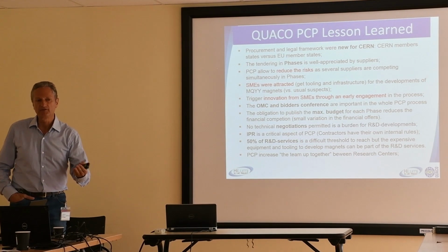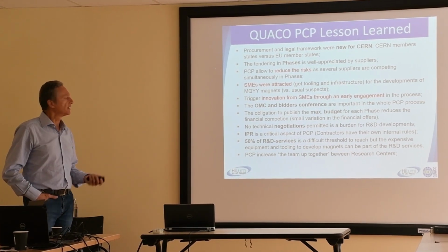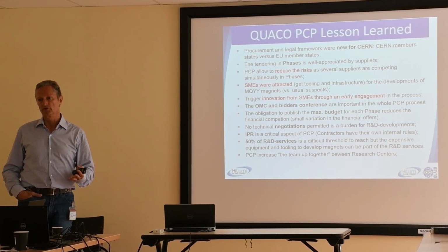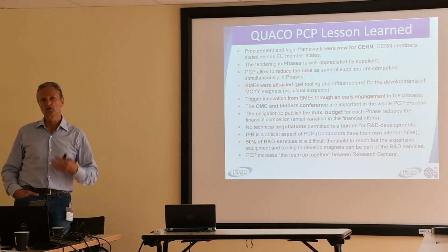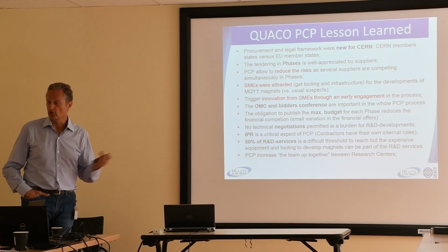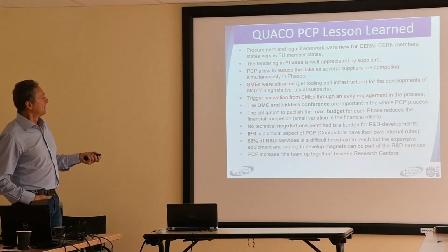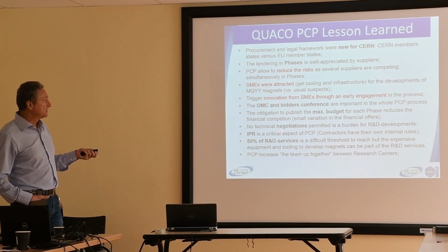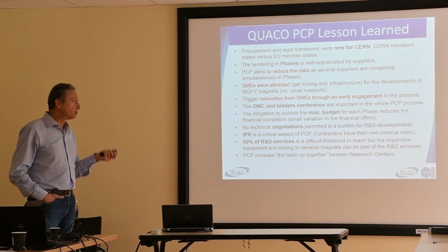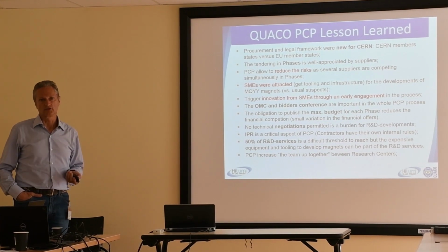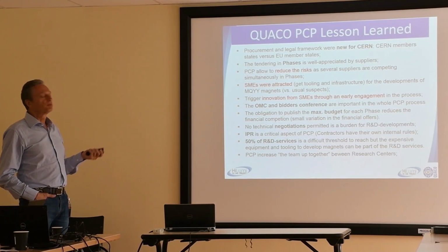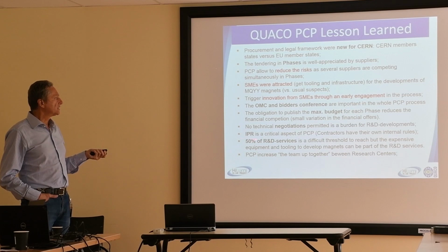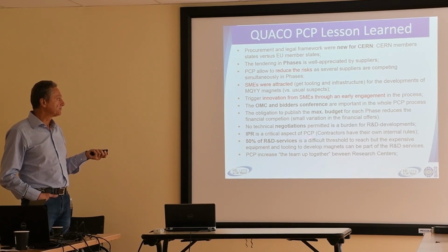When they give you an offer, you have to evaluate what they have offered, and you cannot go back and forth unless you go back to all the other tenders. This, in my opinion, is a little bit of a drawback. It should be suggested to the Commission to find a way, because it could improve the process.